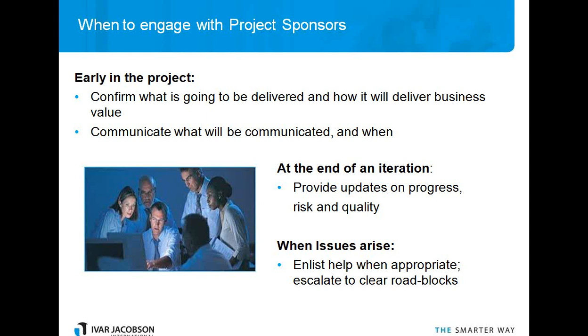In addition to that, it's important to set up expectations on when you will be coming back to the project sponsors with additional information on how the project is going. This gives them at least some understanding of how you're going to be working: if you're working iteratively, when the iterations are going to end, and when they can expect to see new information about how the project is going. If you're working on a classic or waterfall style project, these communication points are typically aligned with the phase endings and often with some sort of monthly reporting cycle. I'll continue looking at this from an iterative perspective because that's my favorite way of working.